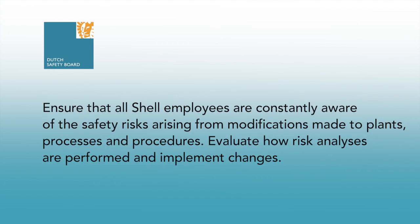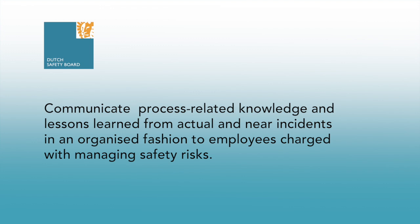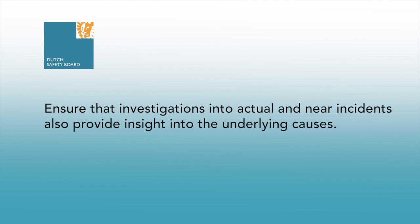The Dutch safety board recommends that Royal Dutch Shell ensure that all Shell employees are constantly aware of the safety risks arising from modifications made to plants, processes, and procedures. Evaluate how risk analyses are performed and implement changes. Communicate process-related knowledge and lessons learned from actual and near incidents in an organized fashion to employees charged with managing safety risks. Ensure that investigations into actual and near incidents also provide insight into the underlying causes.